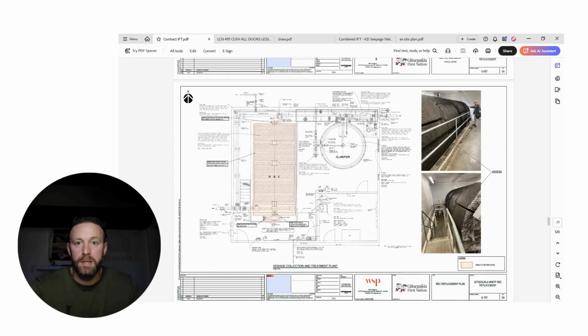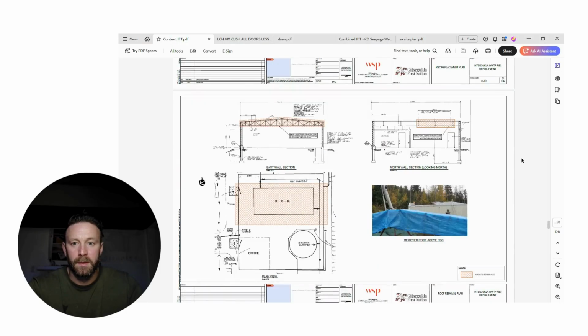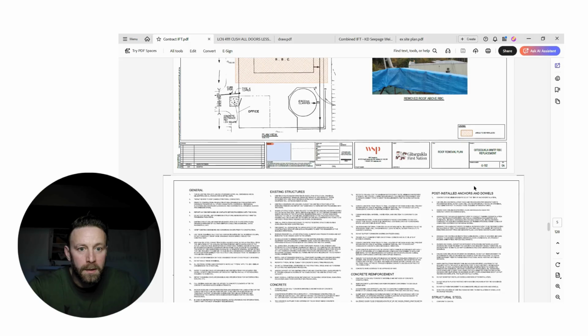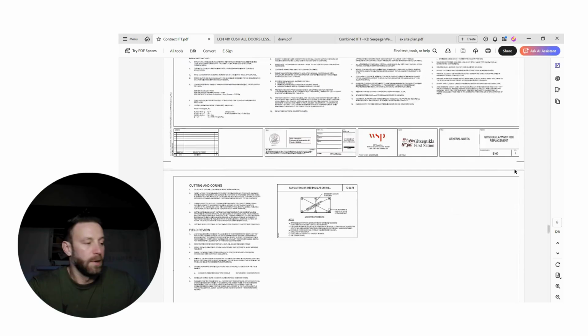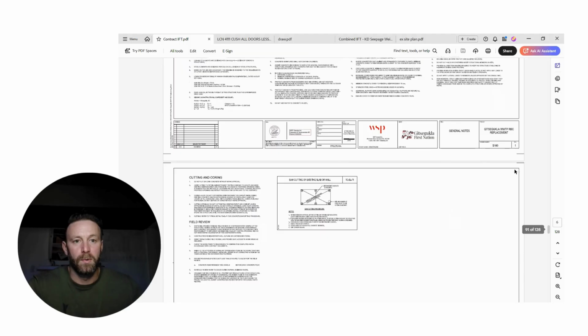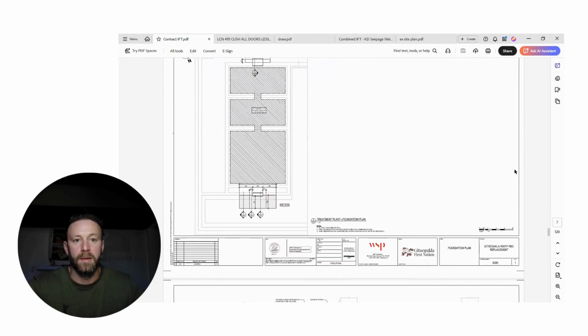Yeah, I'm pretty sure it just excretes the waste. So the RBC is in this area, and the clarifier is here. It looks like we're going to have to remove a section of the roof to crane out this RBC. Yeah, it looks like that's how they loaded it in. So we don't have to take the entire roof off, but I know I'm going to need roofing. I'm going to need a crane. As I go through the drawings, I'll usually make notes of which subcontractors are required. You'll also be able to see that through the specs. That's a roof removal plan.